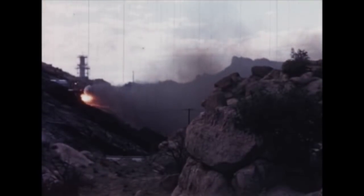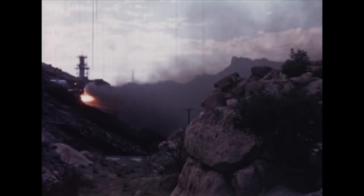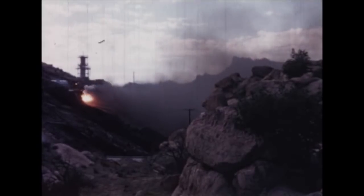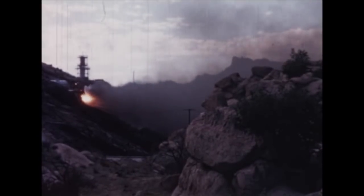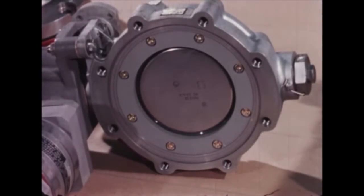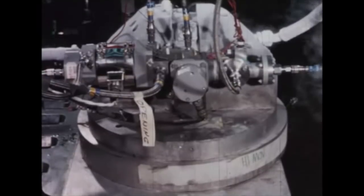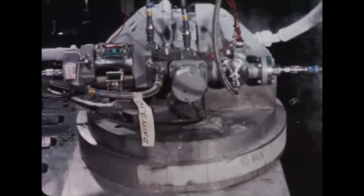The reliability demonstration program was completed with testing of the qualification engines. Based on a demonstration sample of 333 pre-declared tests, a reliability of .9946 at 50% confidence was achieved. Completion of the component qualification program was also attained during this report period. The last of 8 components to be tested in this program was the main LOX valve, which is observed during vibration test at cryogenic temperatures.